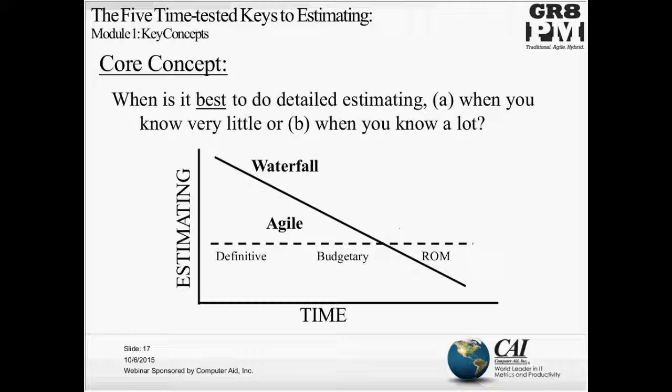And those budgetary estimates are extremely crucial to support what we like to call the organizational customer. You see, the organization has to provide resources for the team to, in fact, build solutions that the customers want. And in order to do that, they need those budgetary numbers. On the long-term horizon, it's possible to do ROM, rough order of magnitude estimates. And again, decision-making is occurring at the ROM level on the far time horizon. So we're providing adequate and appropriate support to decision-making.